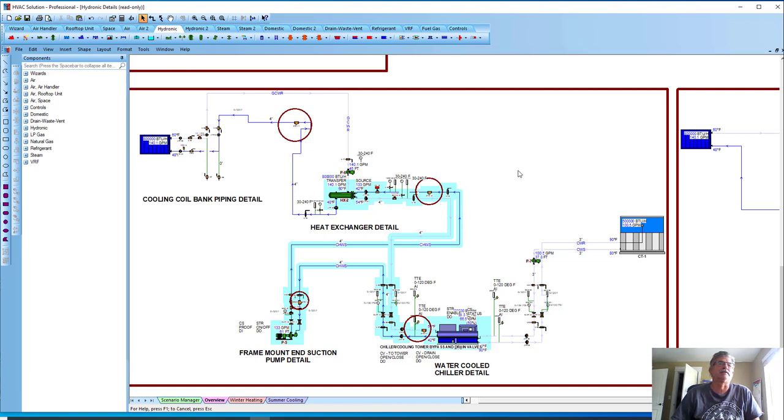And what Martin likes to do on projects, whether it's bid kind of design build or plan and spec, the first thing he does when he's looking at a project, while it's being bid or after it's being bid for sure, is he goes through and he models the system, and he sees things like this, and then he'll ask questions and say, hey, all those aren't needed, right? Or down the road, he just gets an RFI and takes some out, because you don't want to put those in, right?